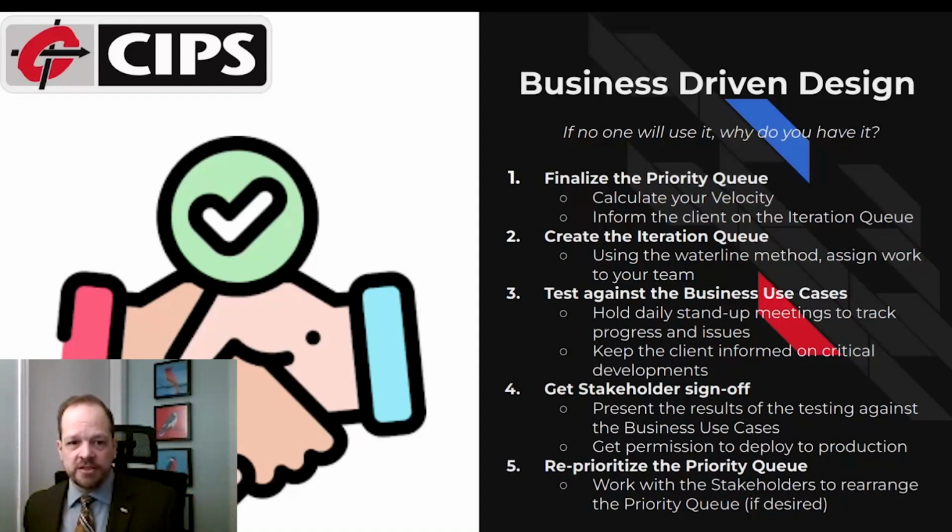Story points just use a Fibonacci sequence. So 1, 2, 3, 5, 8, 13, 21. Take the previous 2 numbers, add them together, next number. And you'll go to your developers and say, this report, how complex is it on this scale? So if you have a report that's 13, is it more complex than this 13 item, or less complex? If it's more complex, then maybe it's a 21. If it's way more complex, a 55. If it's less complex, maybe it's an 8. If it's really less complex, maybe a 2 or 3.